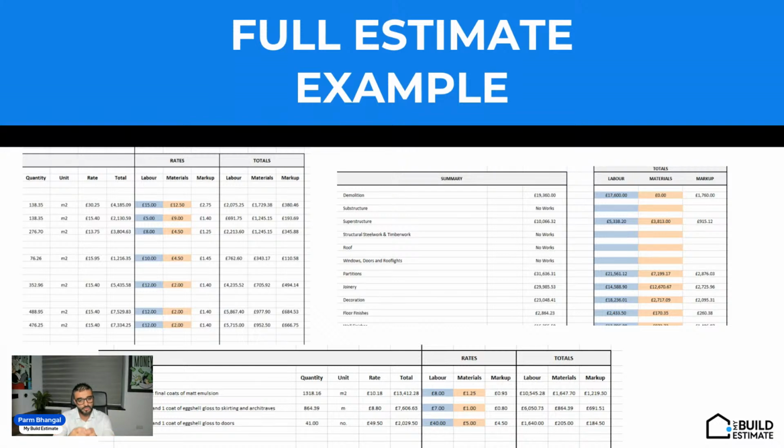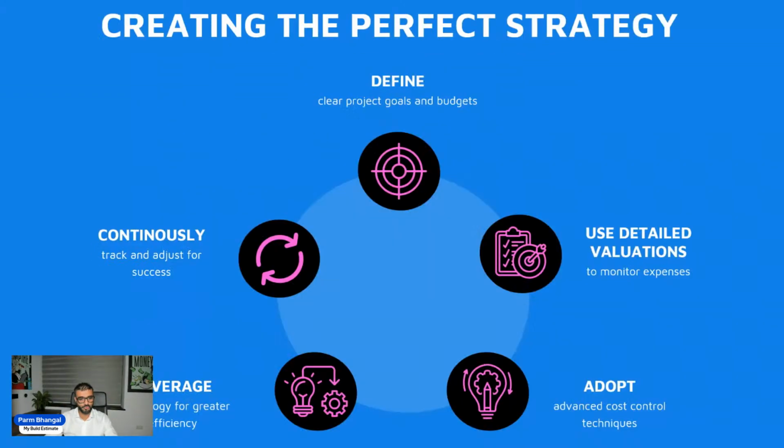Once you do that, you know you've got a margin on your materials. You can cross-check and cross-reference every item. You've gone and got a price from Jewson's, Travis Perkins, wherever it might be, and they provide you a cost for the paint, for instance. Jewson's coming at £1,700, Travis Perkins coming at £1,400, MKM coming at £1,000. You know you've got an X material allowance, and that's what you're buying. So you know what supplier to go to. You know what you need to negotiate. You know how to make that item more profitable.